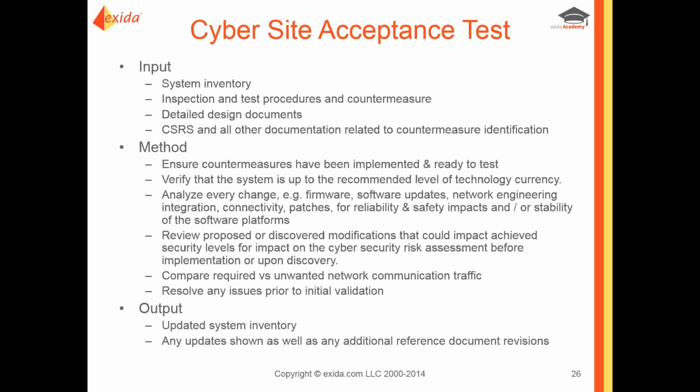When you get into this, you should have available to you your system inventory, all your inspection and test procedures and countermeasures that are supposed to be in place, all your detailed design documentation, as well as the cybersecurity requirements spec. To accomplish the test, you'll inspect and test as appropriate each of the countermeasures, and make sure that the system is up to the recommended level of technology currency.